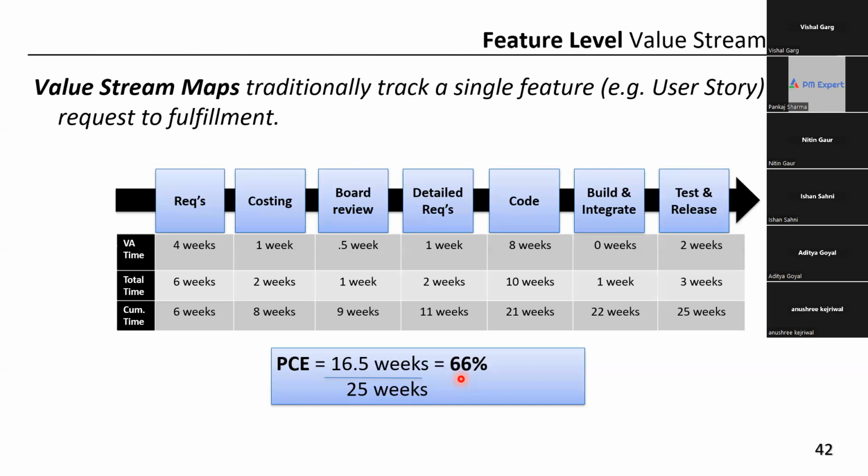Does it save time or not? Yes. It saves time. In fact, it maximizes the value added time. It reduces some of the non-value added time. So this is the purpose of value stream map, to understand and analyze any process, any workflow, any value stream, by depicting it visually, and try to find out which steps are value added steps, which steps are non-value added steps.